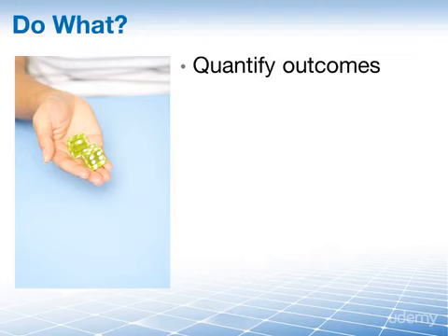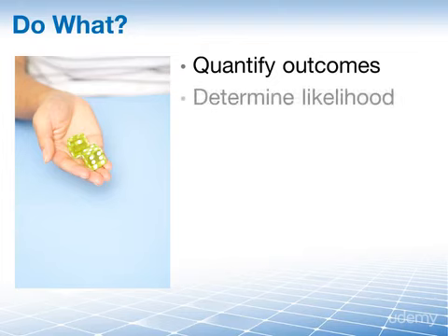For instance, there is a 30% chance that we will have technical problems due to communication issues among our subcontractors, the outcome of which could have a consequence of $12,000 in lost production each day. It also helps you to determine how likely it is that you will be able to reach your original goals.